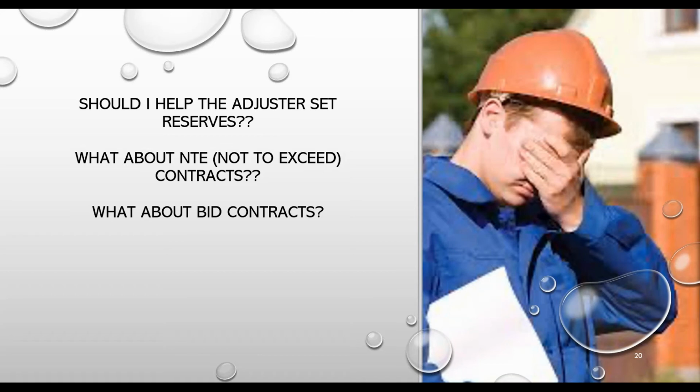The devil in the details with this is the adjuster needs to be within 10% plus or minus on his reserve for the entire job. And if you're wrong either way, he's not going to be real happy about it, as his bosses will not be real happy with him. So if you want to stay clear of that and let him do it, one practice that a lot of folks take is to give them a daily burn rate.